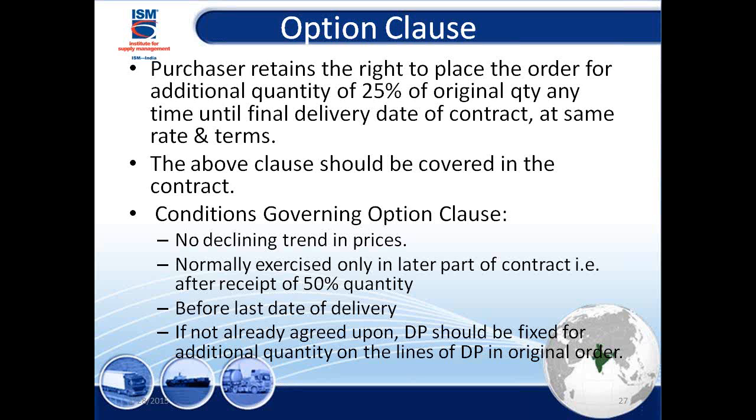You will not say, okay, now you place an order today and this contract delivery was supposed to come in 3 months, then after 1 week, you say, I changed the quantity by 25%. No. Because that means mentally you are intentionally splitting the contract. You know very well in the public sectors, we have a threshold. Sometimes what the big director thinks, okay guys, let me split the contract because this is within my authority. The moment I do the total thing, it has to go to a bigger boss. So you split the contract, which we don't encourage.